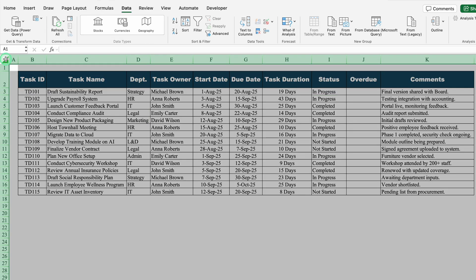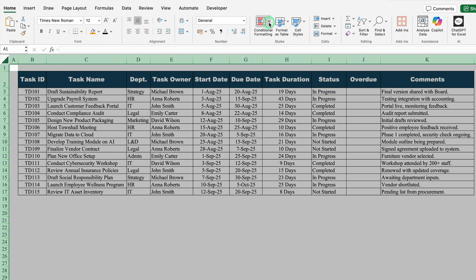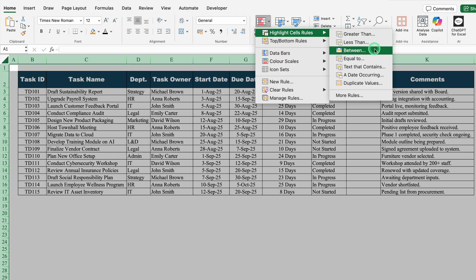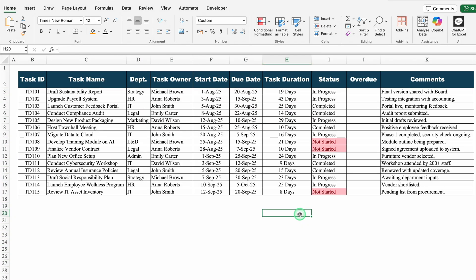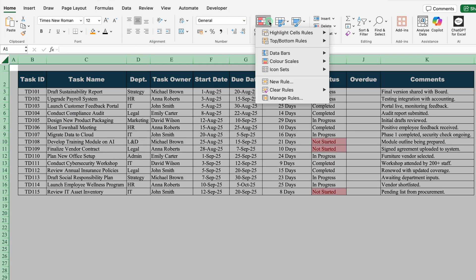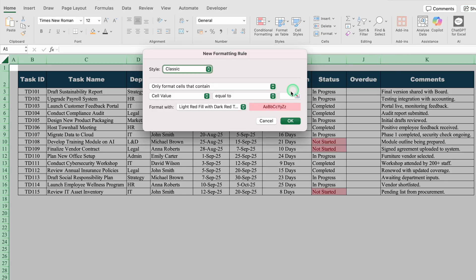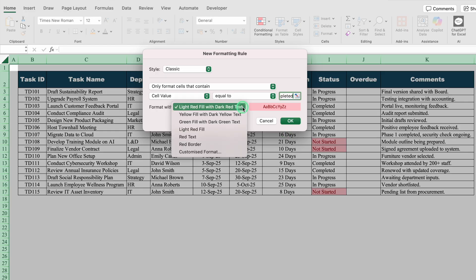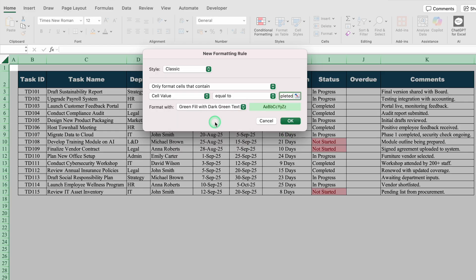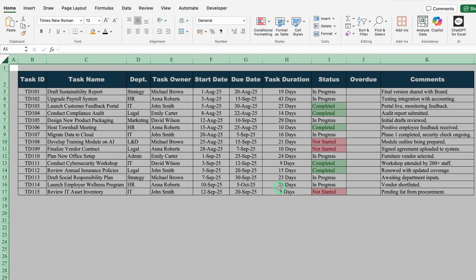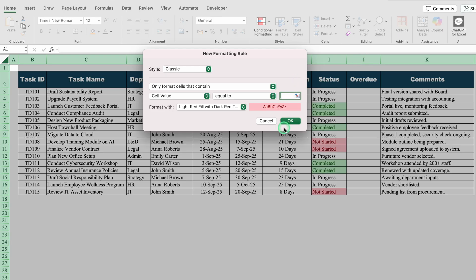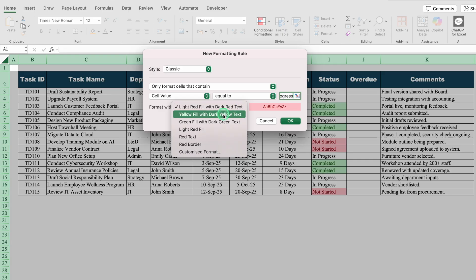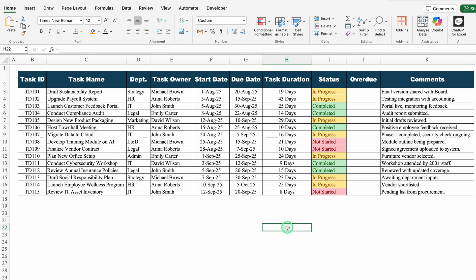I will select the whole sheet, go to Home tab, and click Conditional Formatting drop-down. Highlight Cell Rule — Equal To — and I will type 'not started'. By default we get red color. I will click OK, and all the words 'not started' got highlighted in red. We will select the whole sheet again, Conditional Formatting, Highlight Cell Rule, Equal To, and this time type 'completed'. We will select green fill with dark green text and click OK. Completed got highlighted in green. For 'in progress', we will go to Conditional Formatting, Highlight Cell Rule, Equal To, type 'in progress', select yellow fill with dark yellow text, and click OK. All the statuses got highlighted.